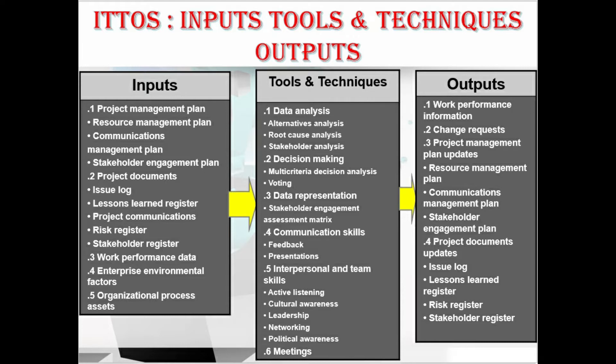Let's go through the ITTOs. In inputs, we have the project management plan, which contains the resource management plan, communication management plan, and stakeholder engagement plan. We also have project documents, which contain the issue log, lessons learned register, project communications, risk register, and stakeholder register. Additionally, inputs include work performance data, enterprise environmental factors (EEFs), and organizational process assets (OPAs).